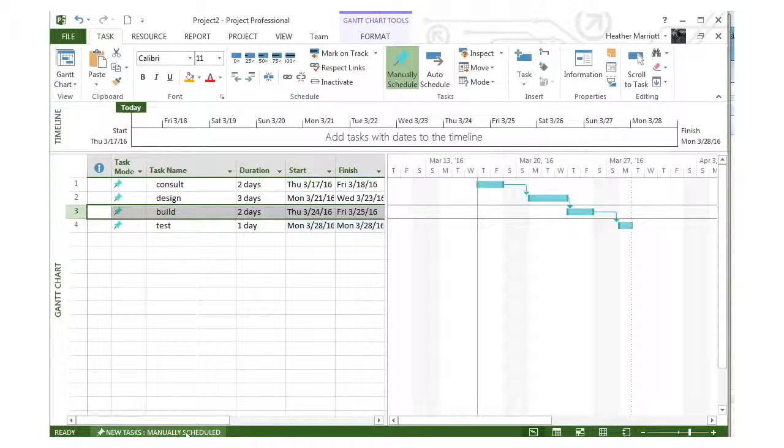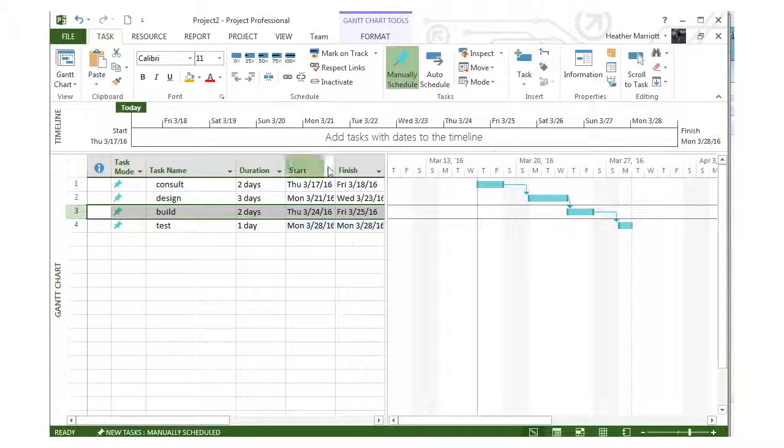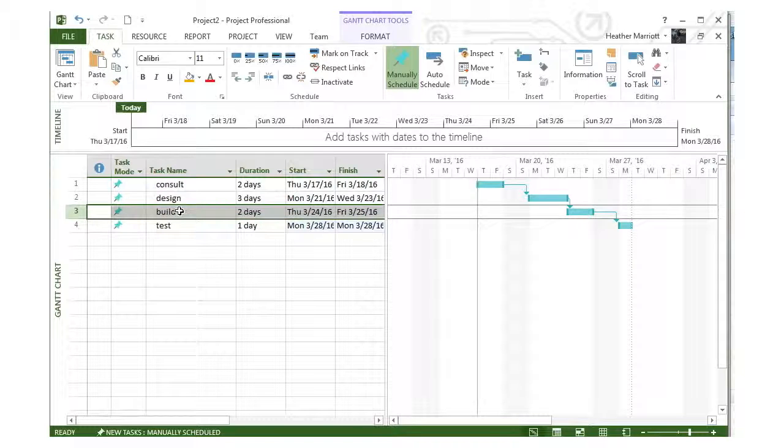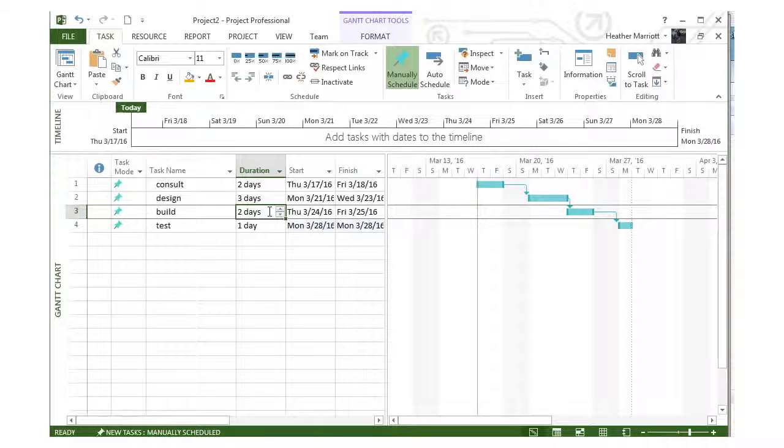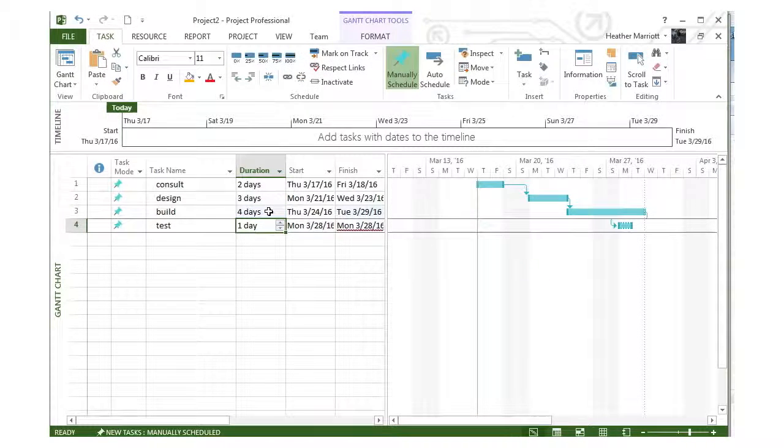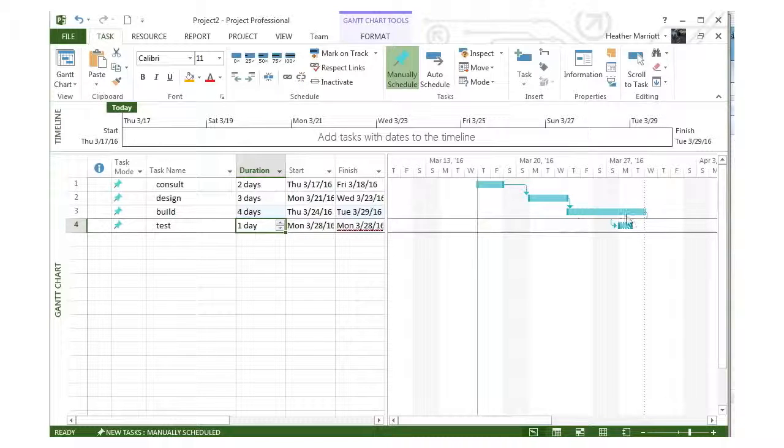When using manual scheduling, Microsoft Project will not alter the start date once it's set. For example, if I underestimated my build task and change it from two days to four days, notice that I'm now starting testing before I finish building the project.